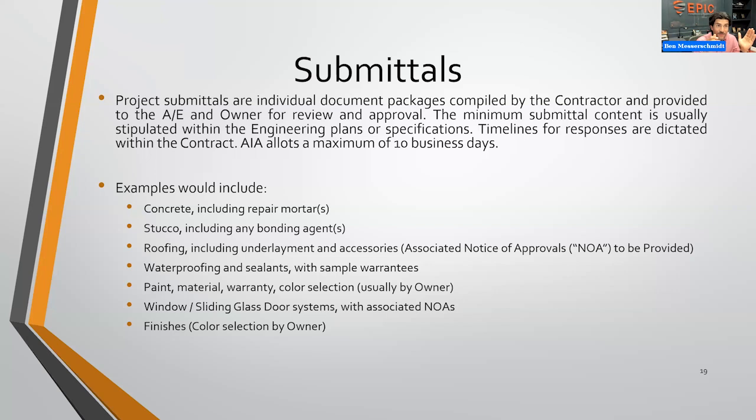Now that's one end of the spectrum. The other end of the spectrum is you can have an NDL warranty, so a no dollar limit warranty. And that means that it would cover the palm. It would cover the dirt. It would cover the labor and the materials to get there to a no dollar limit.